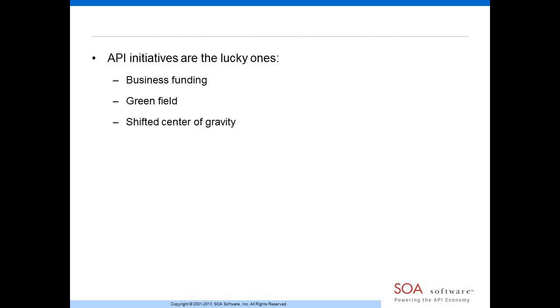As much as if they were selling a car, they are going to go out and promote this API. So it has funding. And that was one of the things about services that was always a challenge. You always had to try and figure out how you were going to fund a service orientation because it was across different projects. But if there was a way, and I believe that there always should be, and we always recommended this to our customers, when they were embarking on an SOA, get funding for the services themselves. Don't try and shoehorn it into different project budgets.